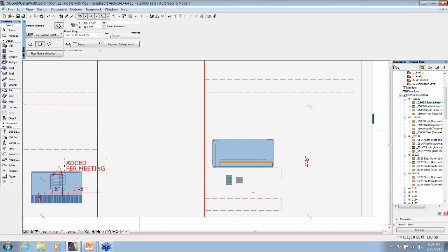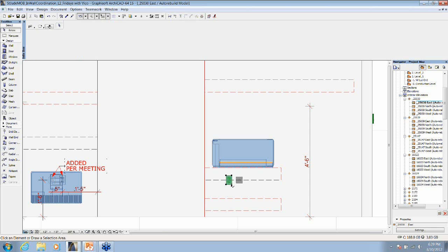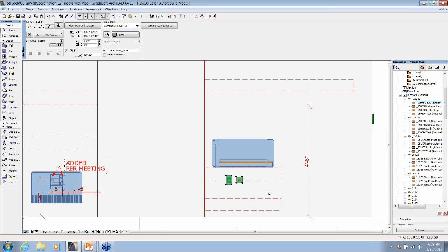If we follow the construction sequence of placing casework versus building partition walls, we know that partition walls come first. We place the outlets there, and only after that comes the casework. So it would have been quite a problem if the outlets were placed behind the casework. So it would definitely have become a change order that we wanted to avoid.